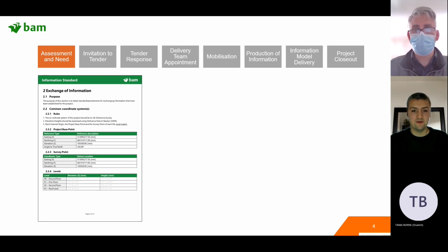So you have to figure out how to move them. You have to tell them, can you adopt the coordinates from the architect's model, please? Again, really surprising that these things aren't done. But ISO 19650 forces the whole delivery team to do this right at the beginning, and for everyone to be using the same coordinates.